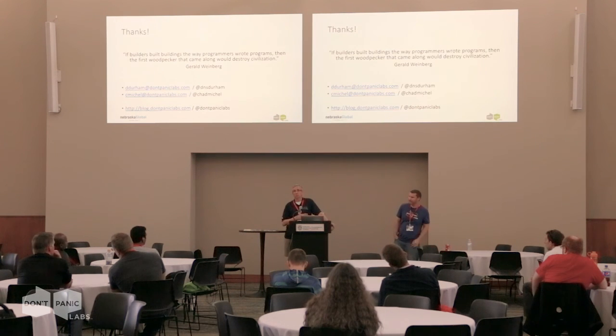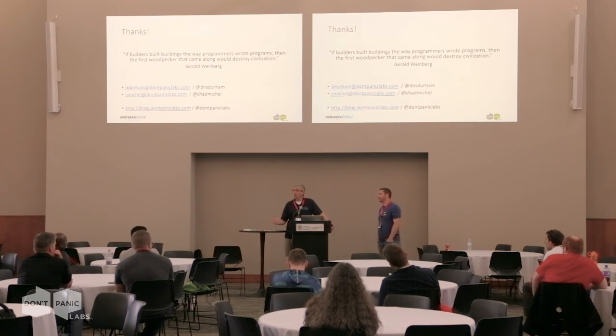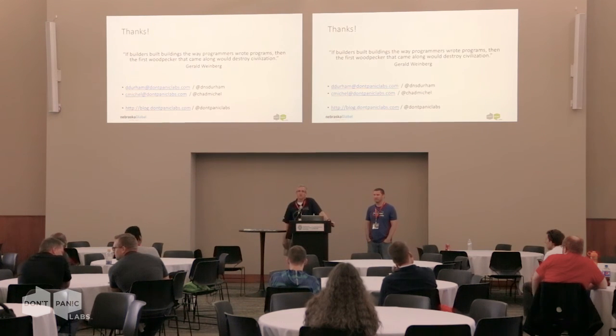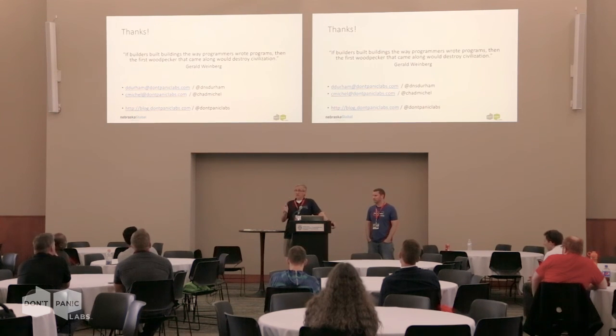A lot of times, if it's very UI/UX driven, we demand that the UI/UX work gets designed well in advance before it gets handed off to developers, because a lot of times that uncovers some complexity or some hidden assumptions within the system that we don't want to be discovering during the sprint. So we're trying to uncover a lot of that early on. So yes, I think that happens when appropriate, and I think we're pretty good at recognizing that. I think you would be too.